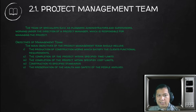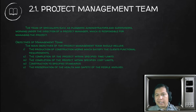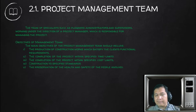Then you have construction to specified standards. You already understand what specifications are, but it's much deeper than that. When you do your specifications, they should be based upon higher-level standards in the construction industry. For example, it should be based upon ASTM standards, the International Building Code, or in the Philippine setting, at least it should comply with PD 1096.